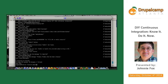How much overhead does this add? We're on large projects with a timeline. I find that it adds something like 10% to the project estimate. I think it's a bit naive to assume we wouldn't always have that unexpected bug testing phase when we got to UAT. It's been an argument with management — this is something we need to do so that we can have defensible, predictable estimates. On some projects, not testing works great; on other projects, it just goes to hell.